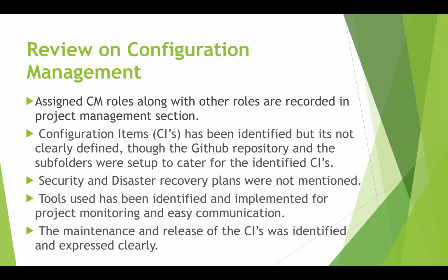Next one is the review on configuration management. The CM roles, along with other roles, are recorded in the project management section. Since we only have a handful of group members and everyone has several roles to fulfill, we merged them all together and recorded them in the project management section of the SPMP. I realized that it would have been better and more visible if the configuration management roles were also clearly identified for easy reference.